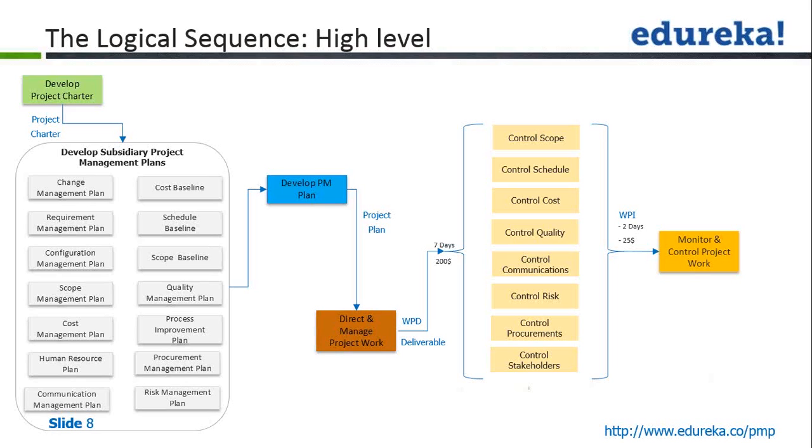We will also check what our forecast is based on this. Let's say you are supposed to achieve a milestone on 30th of June. With this progress, with the deviation of 2 days, will we be able to achieve that milestone on 30th June or not? That is linked to the statement on the first slide, where I said helping the project manager to look at the big picture.